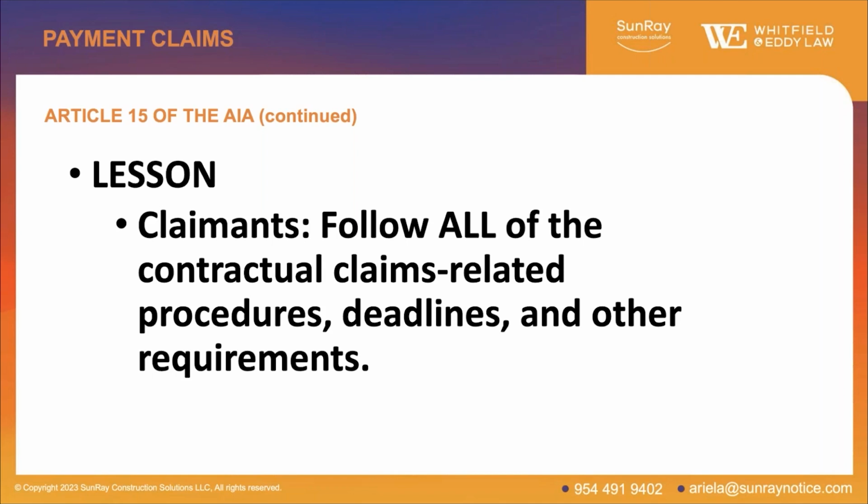We're making a claim for extra money and time on this. You might not know the amount, but at least you're going to give them notice that you're going to seek that. And then as you progress with the project and the amounts of time or money become firm, you can supplement that notice with the amounts in the backup.